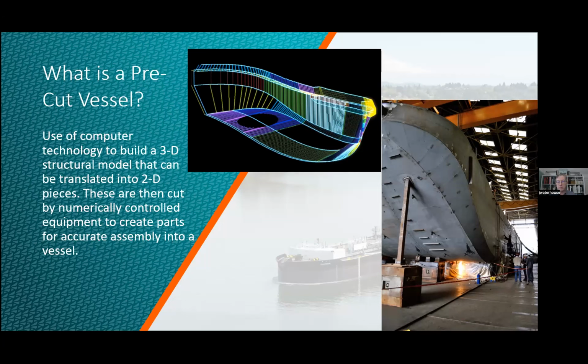One of the ways to think of a boat is that a builder already purchases assembled items such as a generator set, a doorway, a control console, etc. So when you're looking at building a vessel, the question of what to manufacture or build yourself and what to buy is very much a part of the planning and thinking process. Items that you are buying obviously will cost more, but they can certainly offer advantages.